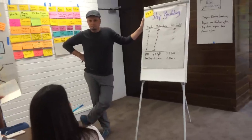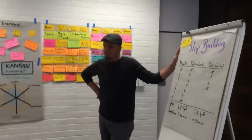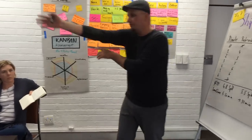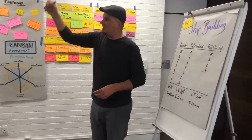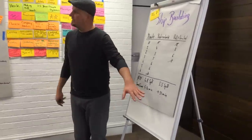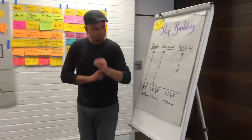You actually produce faster than the push system. We had a lot of stuff started, but nothing finished, so we had to finish all those other things before we could finish that one. It took forever for that one. Exactly, because the whole system was full with WIP. If you start new work, the work has to make its way through the whole WIP. In the second round, we kept the WIP outside of the system. So whenever we start working, we can guarantee that this work gets finished very fast. And very fast means a factor of 3 in this case. That's really faster. Does it make sense?